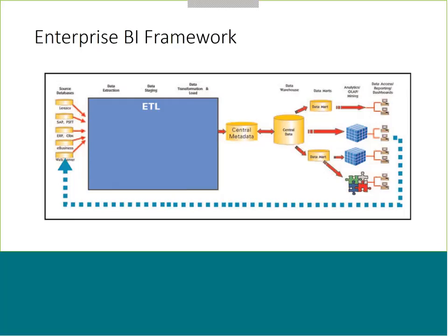It's usually people get a bit too carried away in terms of what they're going to put into the new system. And also, they don't truly understand the data that exists in the existing system. So the data migration part suddenly becomes a massive problem, and just drags on and on. And then when it goes live, you end up with lots of outliers, and that tends to be when systems start to miss deadlines, and people in the end say, oh well, forget it, we'll just keep the original system.